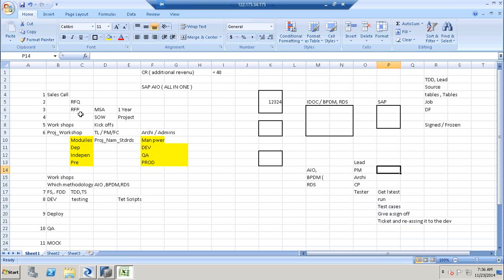The project manager is involved right from the creation of SOWs, because once we create these SOWs, we also have to create deals within our company systems, saying that these 10 people will be billable for the next year, or the next 10 months, for this project. This is where a PM gets involved in project management activities.